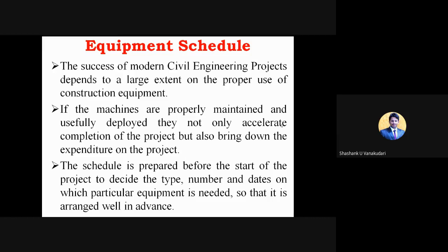If you prefer manpower, it is going to take around 15 to 20 days, right? So for up to 15 to 20 days you need to pay for manpower. Instead, if you prefer the equipment, you can complete it in 1 or 2 days, so the remaining days of payment to the laborers can be reduced, right? So the work will be faster. That is directly proportional: if the duration is reduced, the income or profit of that construction work will also be more.